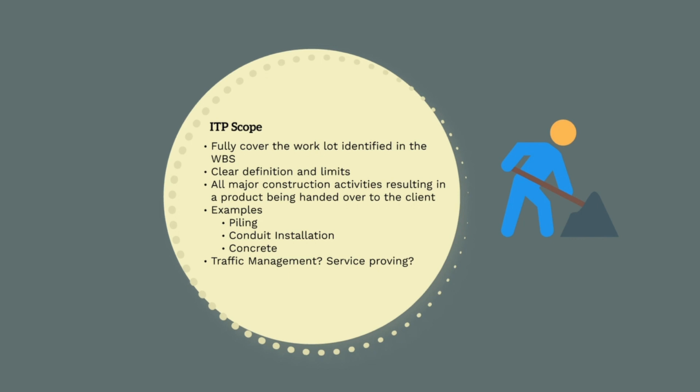What about activities like traffic management and service proving? Well, typically you wouldn't need ITPs for these, as these are activities that facilitate construction works, but do not involve the production of a product that is handed over to the client.